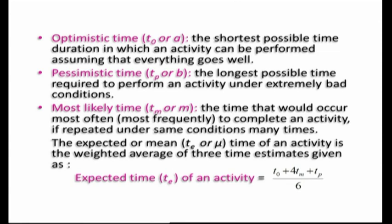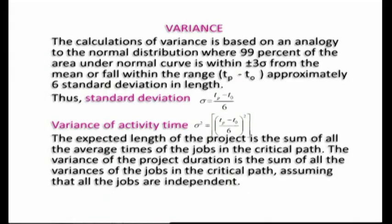The expected or mean time of an activity, denoted by t_e or mu, is the weighted average of all three time estimates, given by: t_e = (t_o + 4·t_m + t_p) / 6. To calculate the estimated time of any activity, we use this formula. We also learn how to calculate the variance, which helps us find the probability of completing a project within a particular duration.